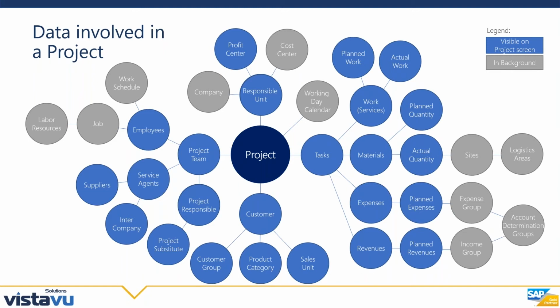So the work schedule is what tells the system when that employee has work days and how many hours they have for work days. Where that comes into play is in the project. If you're using project resource planning and resource availability, that's a critical component for the system to be able to calculate and tell you what their availability is to be able to work on projects.